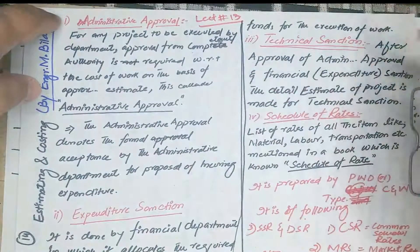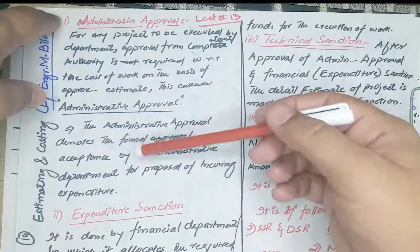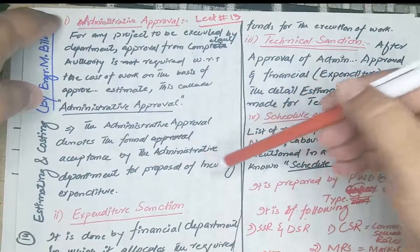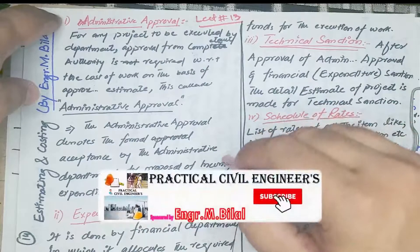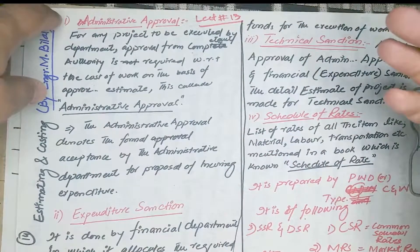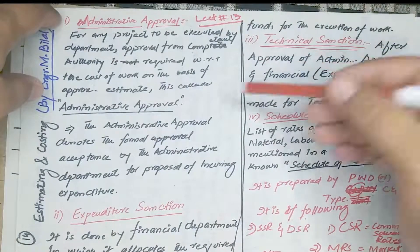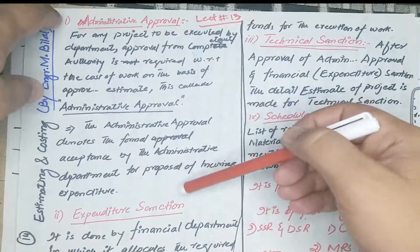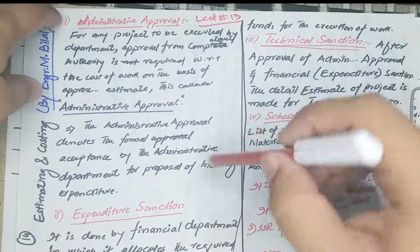The Administrative Approval denotes the formal acceptance by the Administrative Department for the proposed incurring of expenditure. The Administrative Approval is just for the purpose of allocating the fund for the project. After the Administrative Approval, we need the expenditure sanction from the Finance Department.